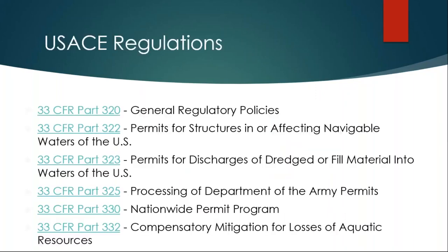Here are just some of the Army Corps regulations. They're all identified in 33 CFR. You can see their general regulatory policies in Part 320, permitting for structures in 322, permits for discharges of dredged or fill material in 323. I'll just keep this up here for a little while and you can refer back to it. When it comes to these regulatory authorities, they're in the CFR, and it's important for us to pay attention to those things.